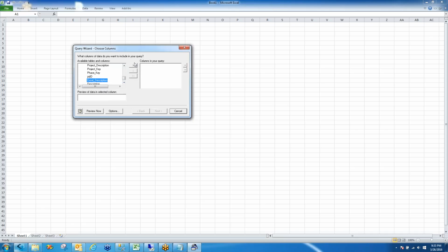and I'm going to pick some fields. This view is a view that I created specifically to pull data to use for a Gantt chart. I'm going to pick the start date, the duration days, the completion date. And I'm also going to pick some fields to sort on, which is the billing type and the sort order, and in order to filter, I'm going to pick the project ID if I want to filter on one specific project. So I'm going to put my sort to the top, my two filters are towards the bottom, and the fields that I need for my Gantt chart are here in the first 4 positions.